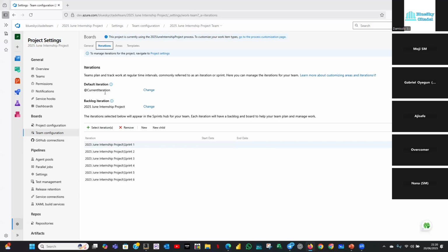And remember the BA said, I'm meeting with the PO so that I can start working on the stories for the next sprint. So the BAs work ahead of the sprint. If the BA starts creating stories and we don't change this, every story they create will go into the current sprint.